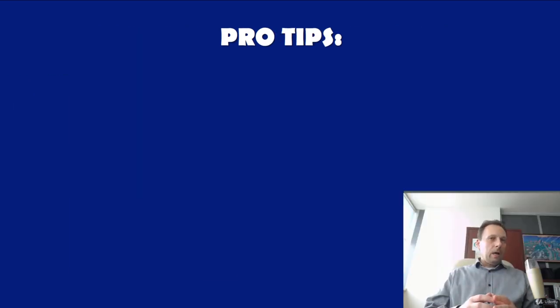And let me give you a couple pro tips. So start with the 2 R's. A team's roadmap and requirements provide a foundation for the product backlog. Roadmap initiatives break down into several epics, and each epic will have several requirements and user stories. Second, keep everything in one issue tracking software. Don't use multiple systems to track bugs, requirements, and engineering work items. Keep it all in a single backlog.